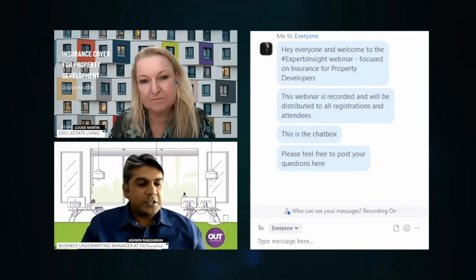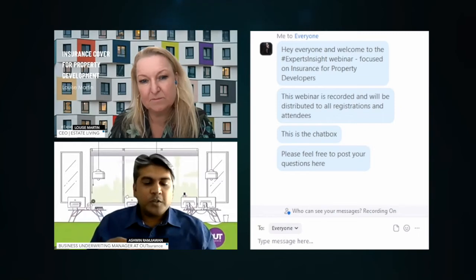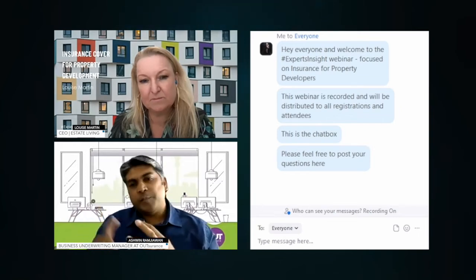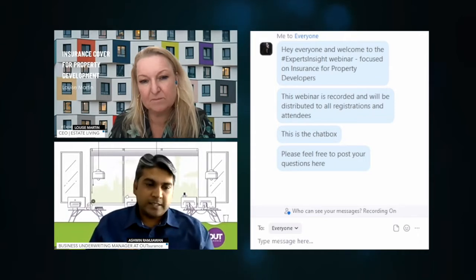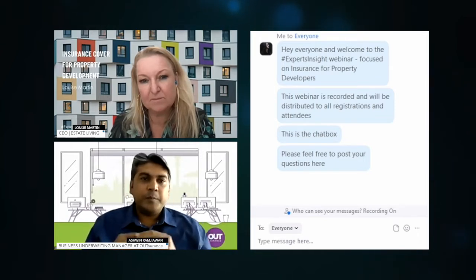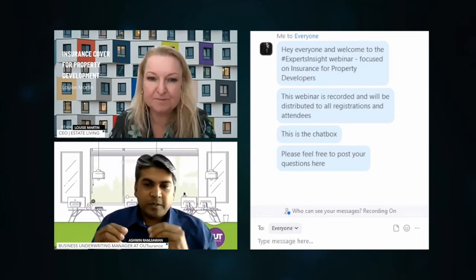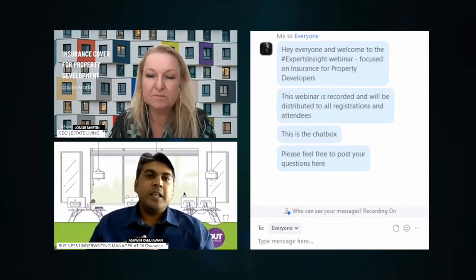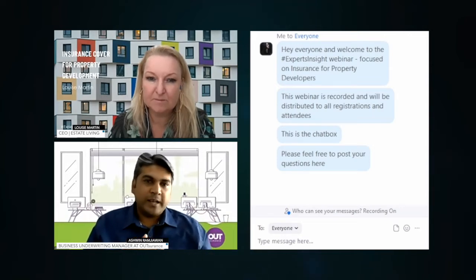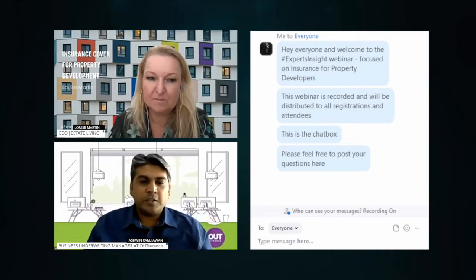Then just the definition of the insured, who the insured is in terms of that product. The insured will also include the employer, the principal agent, depending on who that principal agent is listed in terms of the contract, then contractors themselves and subcontractors. And it could be any other person that's involved in the contract. For example, the actual builder or the actual tiler will form part of the insured if and when a possible incident may arise. That will fall within the definition of the insured under that particular product itself.